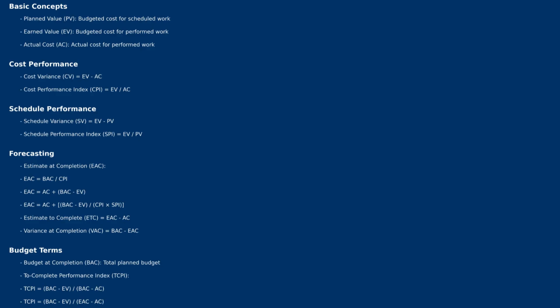This is where EVM comes into the picture. EVM stands for Earned Value Management. It's a data analysis technique for measuring the project performance against the authorized scope, against the authorized time, against the authorized cost. You're going to measure the performance at an integrated level by integrating these three variables. You will find out the deviation from the baseline and take corrective actions. You are able to analyze the current trends and forecast future performance.